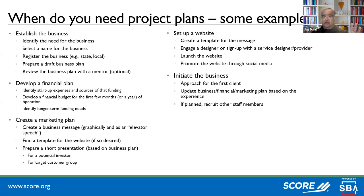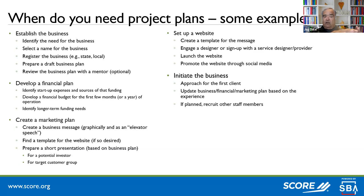These are different examples of creating a project plan. One key thing to notice: I did not create one gigantic project plan that has everything in it. You can do that, but it becomes incredibly complex and a big, long headache. Start with each part laid out in a specific order. Right now I've got: establish a business, then a financial plan, then a marketing plan, then a website, then initiate the business — each dependent on the other, creating a bigger plan without one complex large plan.